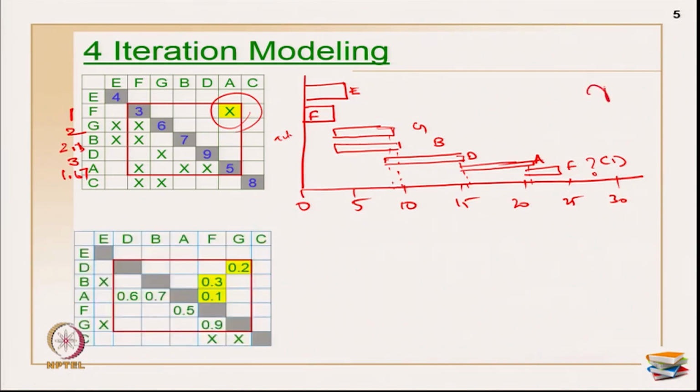Maybe you will get a duration as something like X. Now, for this sequence, we got an alternate sequence by making 3 assumptions here. Again, you may have to evaluate this, maybe with similar kinds of assumptions, such as the durations of the activities being half of the earlier duration. Put it that way and then repeat the activities maybe 1 round, or as planned earlier. Take up the duration, and maybe you get a duration as Y.